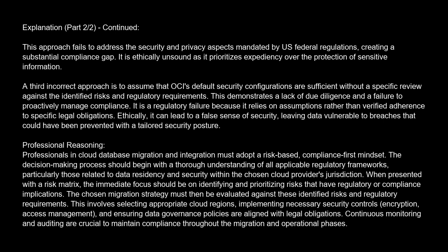Professional reasoning. Professionals in cloud database migration and integration must adopt a risk-based, compliance-first mindset. The decision-making process should begin with a thorough understanding of all applicable regulatory frameworks, particularly those related to data residency and security within the chosen cloud provider's jurisdiction. When presented with a risk matrix, the immediate focus should be on identifying and prioritizing risks that have regulatory or compliance implications. The chosen migration strategy must then be evaluated against these identified risks and regulatory requirements.